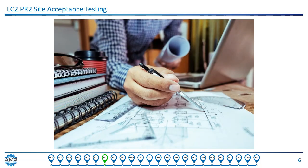The second commissioning process is site acceptance testing, or SAT. The system is tested in accordance with the client-approved test plans and specifications to show that the system is installed properly and interfaces with other systems and peripherals in its working environment. SAT ensures the asset, or the system, is ready to be commissioned. It checks things like a visual check to make sure that nothing is damaged or disconnected and all the main components are installed, that utilities are functional and set correctly, functionality of the interlocks and verification of how the automation works — mechanical and software — that the safety devices work, and that operator training is established and underway.